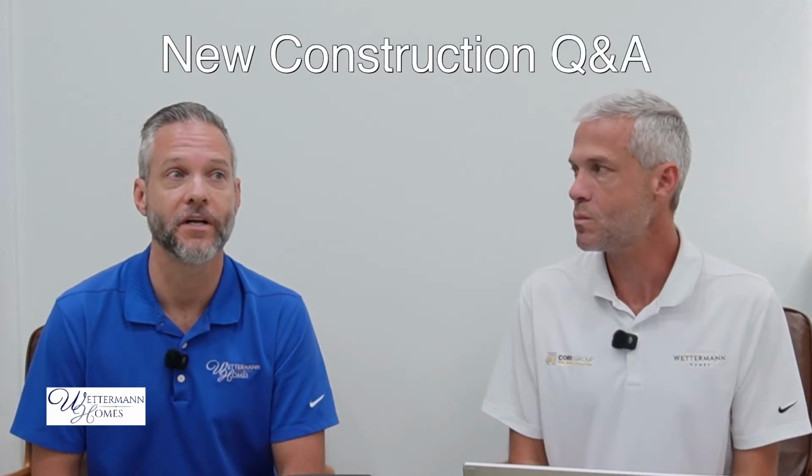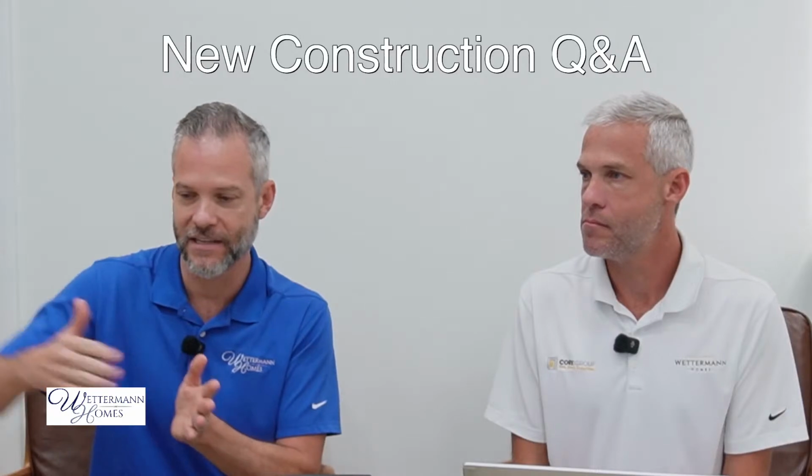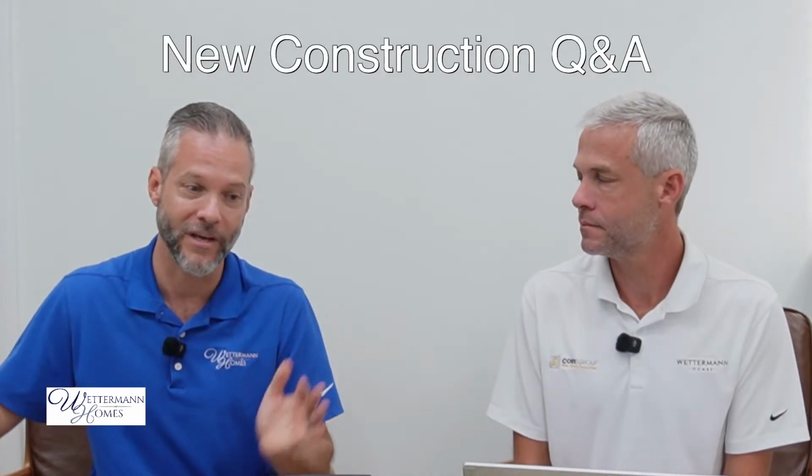So, yeah, it was very insightful because I think we hadn't ever been approached before by somebody wanting to potentially do, and I'll just use the term that Seminole County uses, a civic assembly. It depends on how many people you expect to be using the venue. They have sub 100, and then it goes up from there. Once it goes up from there, it depends on the size of the lot, and then how much parking, and then there's going to be street parking.